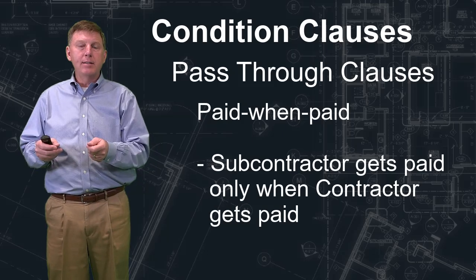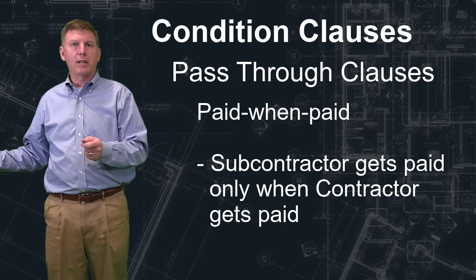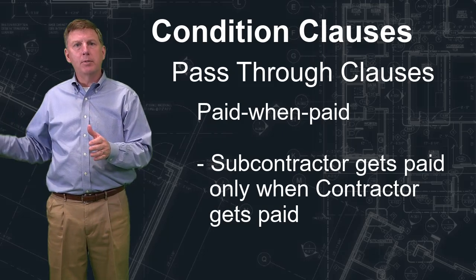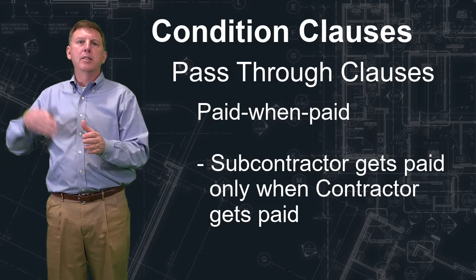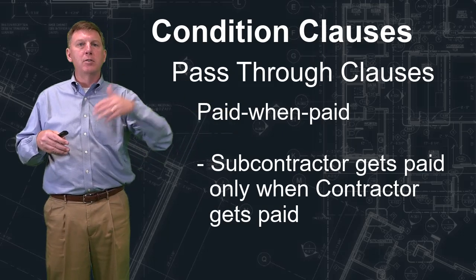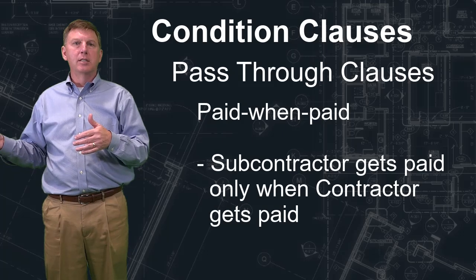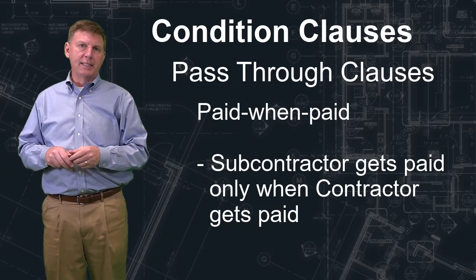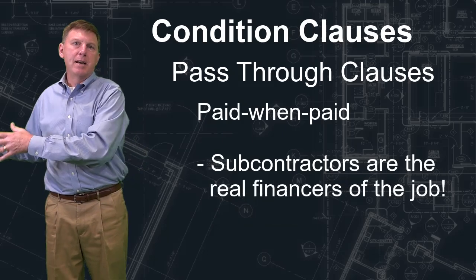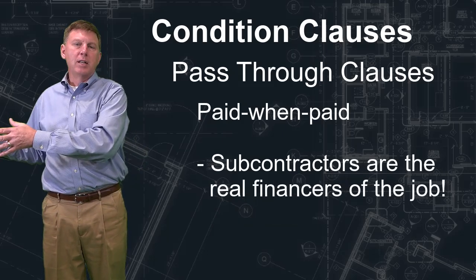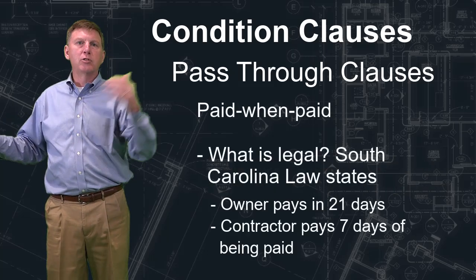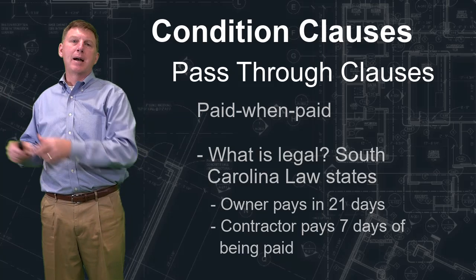Once you get paid, you pay the subcontractor. So now think about how much time it took from the time the subcontractor finished the work, submitted the invoice, you prepared another invoice, submitted to the owner, the owner got around to paying you, and you paid the subcontractor. So who do you think is really financing this job? It's the subcontractor. They had to pay for everything. They had to pay their labor to do the work. And they're not receiving payment until it goes through those couple of steps to finally get back to them.